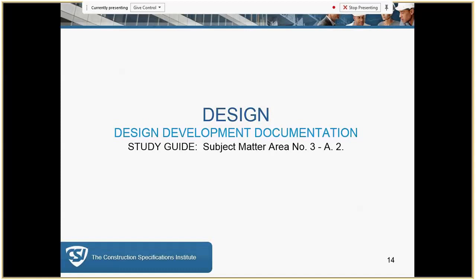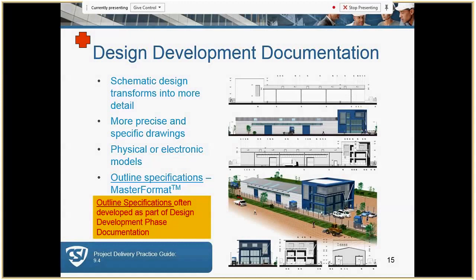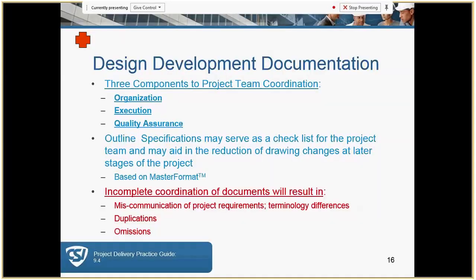Design development documentation: what's going to be involved is that the schematic design becomes more detailed. We're going to have more precise and specific drawings, there will be more physical or electronic models, and outline specs — again the plus sign and highlighted — are often developed as part of the design development phase. Regardless of what we do in actual work life, this is really the point CDT is referring to: they do include the outline specification phase as part of design development.